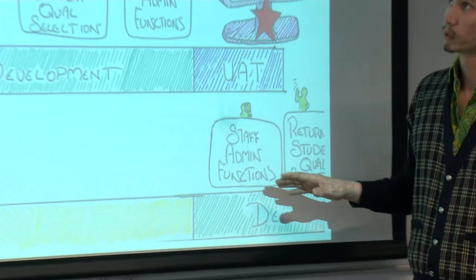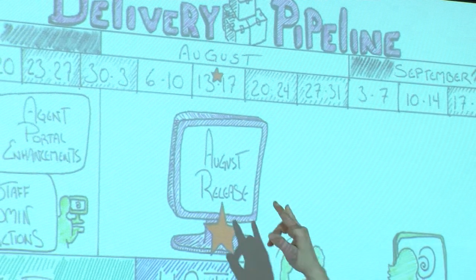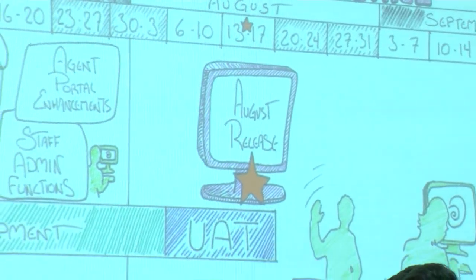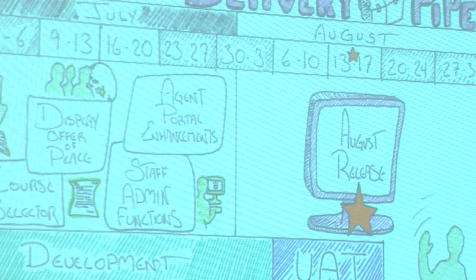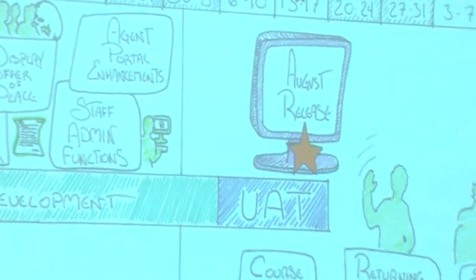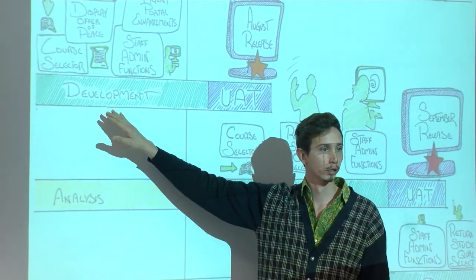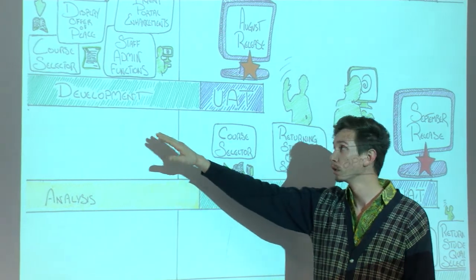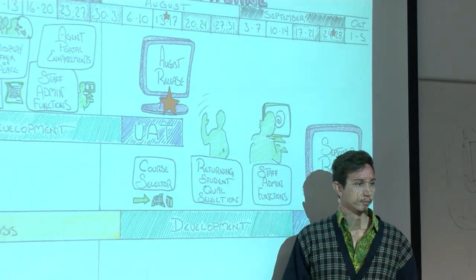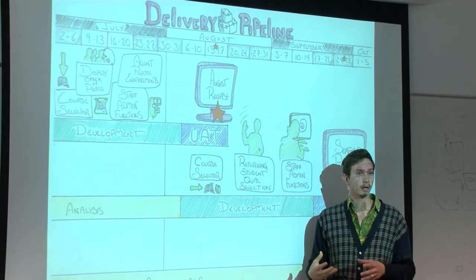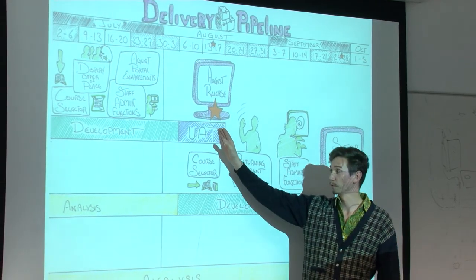And what it looks like as we deliver, you can see we have offset white and black 2-week blocks. Those are our sprints. So with agile development, we work in sprints, and it's all about iterative development and business feedback. Well, we've got 3 sprints of work in this development pipeline. And then we've got about a sprint to do all the release and final packaging activities before it gets pushed out, so that we have a lot of confidence in what we're pushing out.